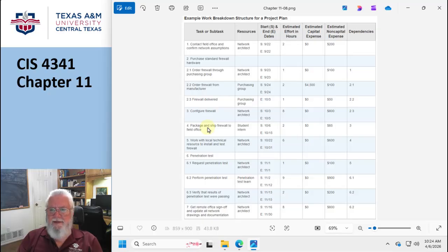It should have the activities and the deliverables. What's going to happen when this thing is done? And here's the key, all right? Every single one of these tasks has to be assigned to a person. Maybe not a worker, but assigned to a responsible person like a supervisor.